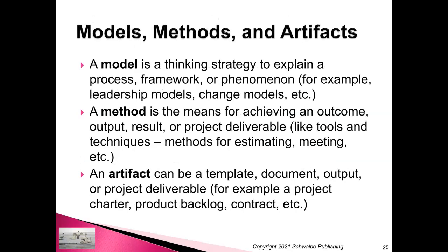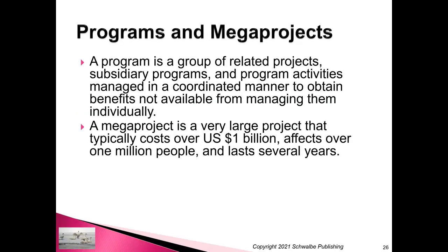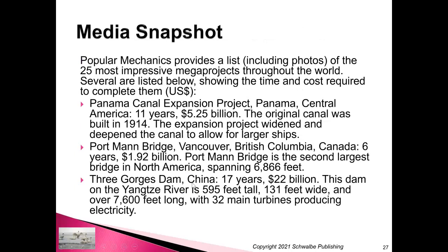Again, some more terms in the current version of the PMBOK guide. Okay, a program is really just multiple projects. So we will talk throughout this course about project management, a single massive billion-dollar project. Okay, a program is multiple projects, right, that are related to each other. And so you gain benefits by being managed by a program manager who is managing several project managers. The PMBOK guide will call a mega project anything over $1 billion, just FYI.